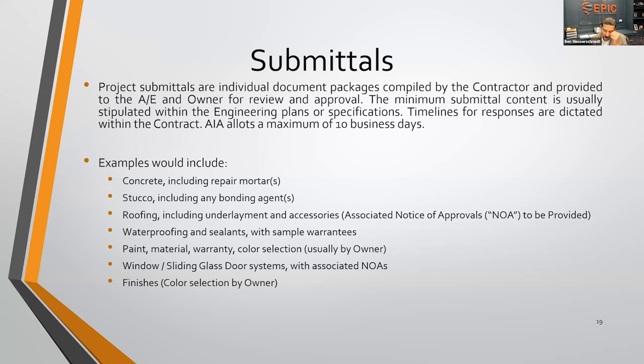Now, it's very important to understand that you'll have a difference between a manufacturer's warranty and a contractor's warranty. Contractor's is mainly just going to be on labor. Those warranties are going to be anywhere from 1 year to 3 years to 5 years, but it all depends on the materials and the details. And if you want to go for a 5-year option, I would expect and budget for added fees from the contractor to accommodate a 5-year warranty from them.